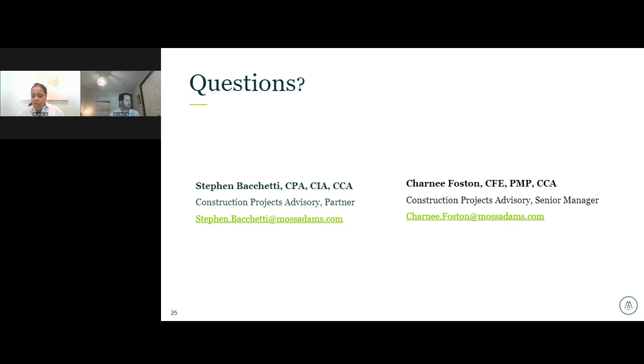What are your thoughts about the construction manager at risk contract relationships? I think from a contracting standpoint, CMARs are great. I think that the shared risk aspect of that and having a construction manager who's working in partnership with you is great. I think it helps from a cost perspective, right? Because everybody is benefiting if the project is successfully completed on time and on budget. There's less errors or rifts in communication, so I think that's great. On the risk side of it, I think if something does go wrong, if there's a claim, if there's a lien, because of the nature of the owner with the construction manager together, there's that single point of failure, so to speak.